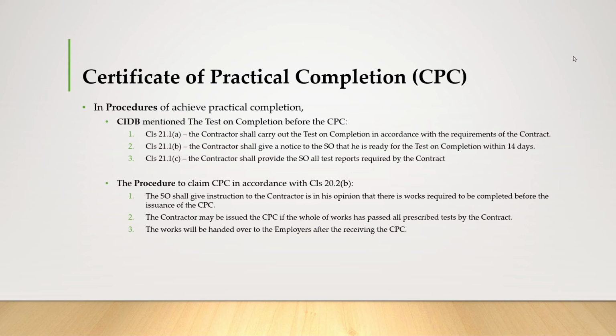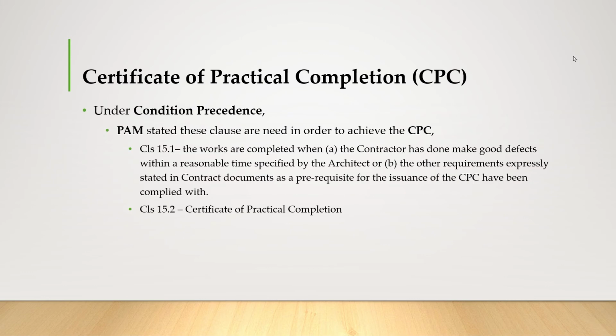And then the contractor may issue the CPC if the whole works has passed the prescribed test by the contract. And the works will be handed over to the employer after receiving the CPC. So under the condition precedents in PAM, these clauses are needed to achieve the CPC.